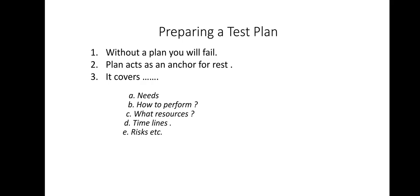The test plan also covers how testing is going to be performed — breaking down tests into manageable tasks and identifying the strategies for each part or module. It addresses what resources are needed for testing, the timelines by which testing activities will be performed, and the risks that may be faced across all of the above, with appropriate mitigation and contingency plans.